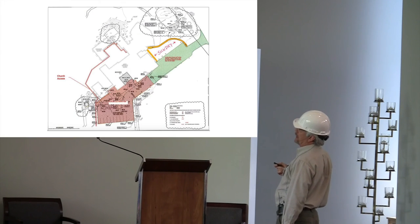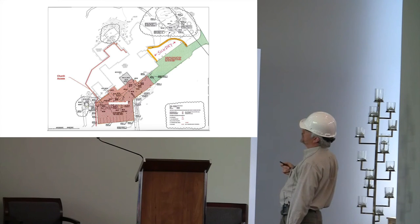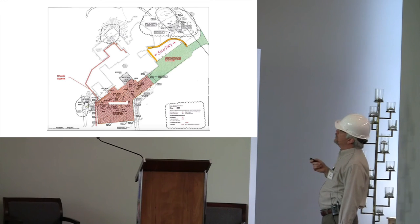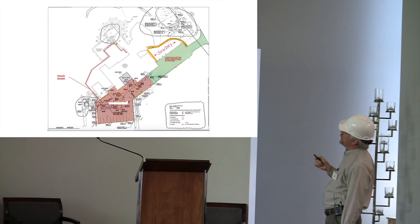One of the main accesses to the building during construction is going to be along this path here. This is the west side of the commons, through the playground, courtyard, and into the pavilion, okay? During construction, that'll be available Sundays, evenings, and so forth. The other thing, during construction weekdays, this is the Woodward Drive. There'll be signs up here, construction entrance only. This is going to be construction workers, maybe some odds and ends, no heavy equipment, but construction workers only during the work weekdays, right?